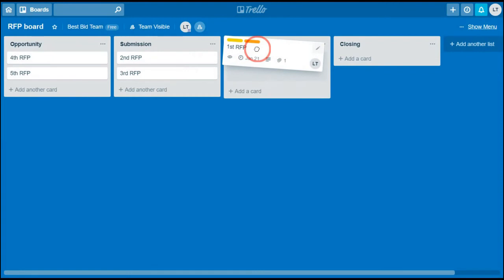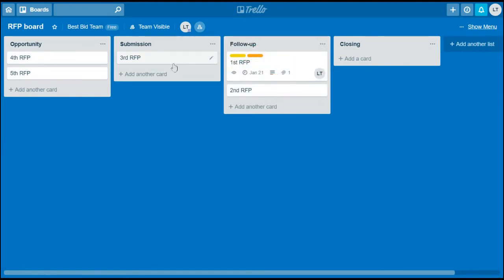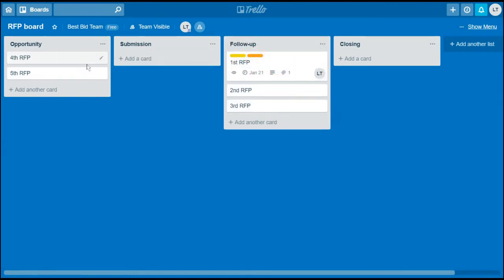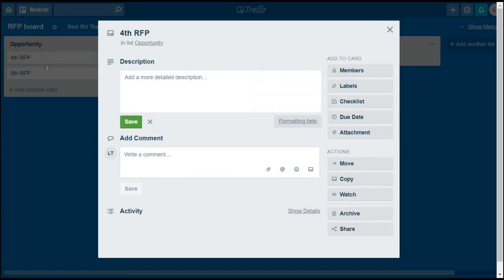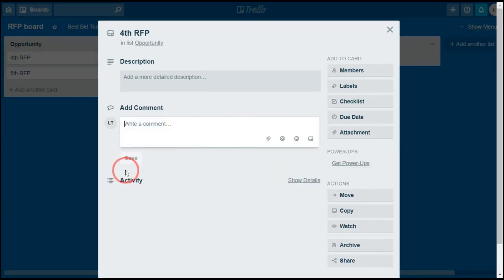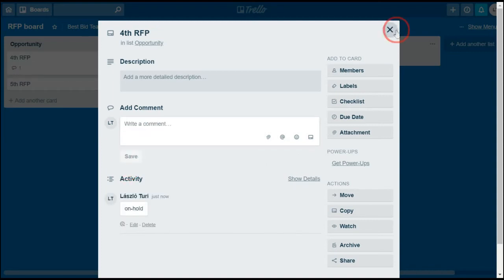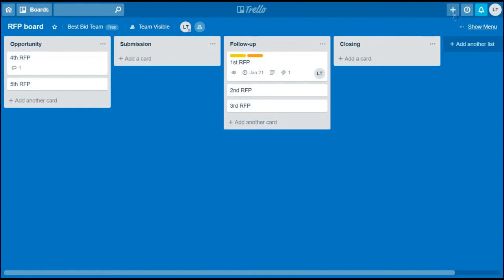Agile teams that are using Kanban board usually define a work-in-progress limit to identify the bottlenecks or overloads. For example, if the number of follow-up tasks goes beyond this work-in-progress limit, you might want to prioritize this activity over a new RFP submission.